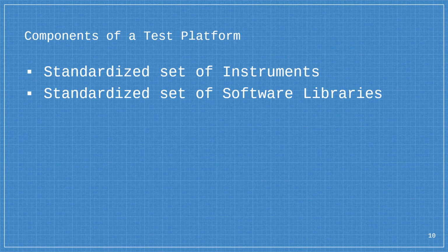If the library does not support the testing he needs, you need a problem report, you need a bug request, you need whatever your company calls it, you need a change request. It may be that same engineer or it may be a different group, but you have somebody go in and make the change in the library, test the library, and then deploy a new version of the library.